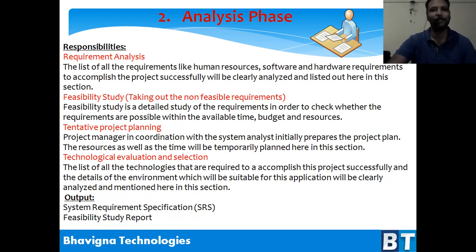Here at this point of time, high level planning will be done, which we can say is phase wise planning. Even a step lower to the phase wise planning, the module wise planning can be done: which module will be built when, and when we are getting the third party deliverables. So all things will be planned here. In the kickoff meeting, we already got the phase wise planning. Here we will get somewhat detailed planning.